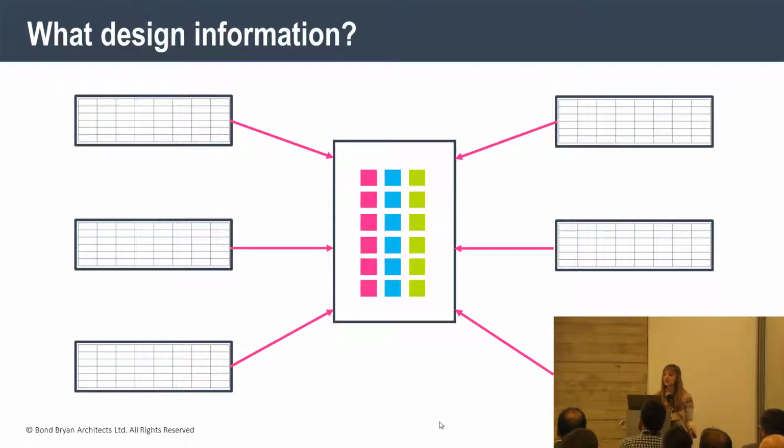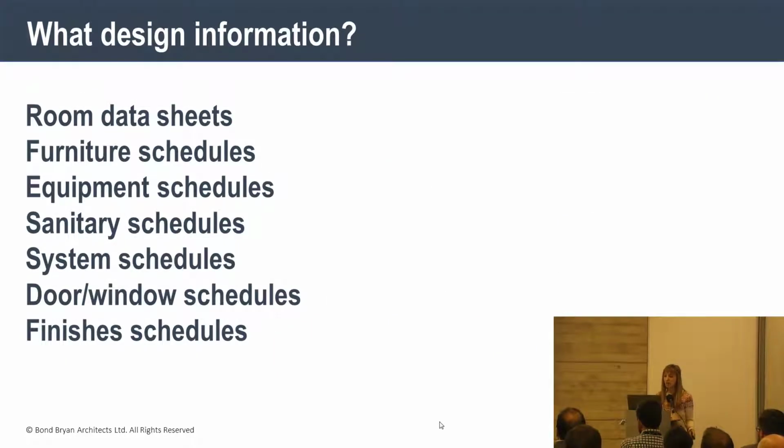The information recorded in COBie is not meant to be anything additional to what you normally produce. It's meant to capture information shown on drawings and schedules and bring it all into one place. And these are some of the schedules which should be captured in it.